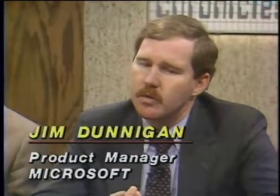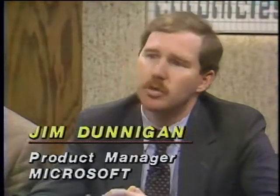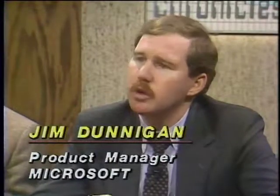Okay, it's different in a couple of ways. One thing that we take into account is with resources, we have individual resource calendars. So if you have a particular resource, let's say, for example, is going to be on vacation for 2 weeks, or it could be a piece of machinery that's going to be unavailable for several weeks, you can actually go in and block that time out on their particular calendar, and when the scheduling takes place, it will take into account the availability of those individual resources.